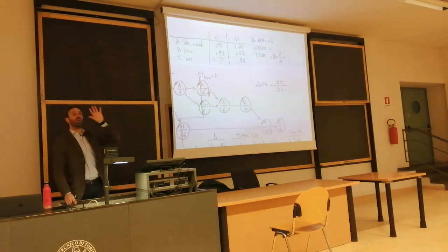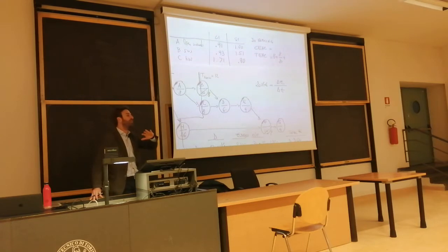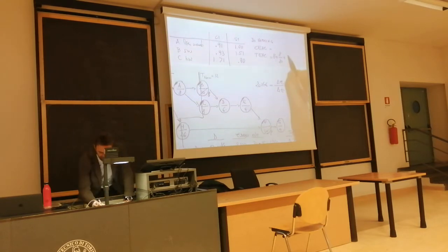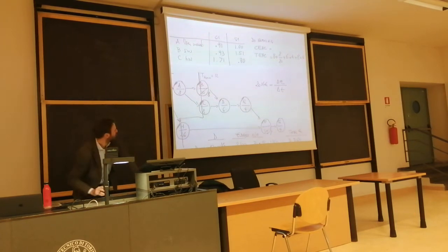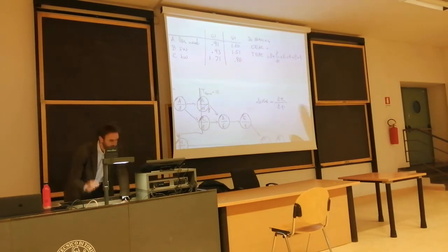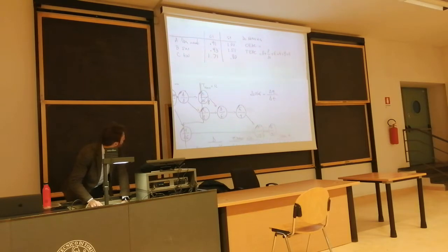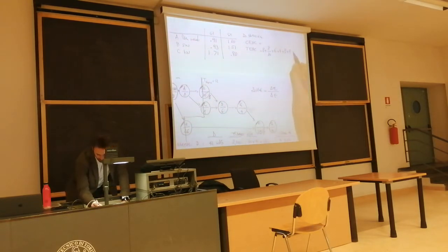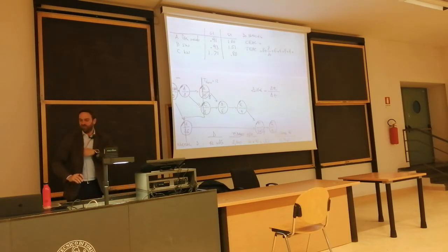No risk will be incurred in the future because all issues have been solved. 6, as planned. What about E? 4. What about F? 8, because it's your crash to plan. Plus G, 4. And the total time estimate at completion equals 8 divided by 0.8, 9.6.